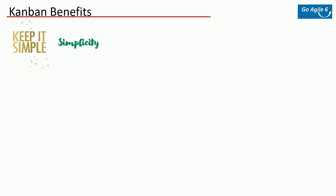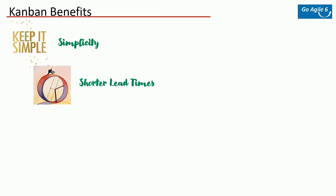Let's look at some benefits of using Kanban. Number one is simplicity — by far this is the least invasive agile framework: fairly simple, flexible, and easy to execute. You don't need a lot of transition or knowledge compared to other frameworks. Number two is shorter lead time. Cycle time is a key metric for Kanban teams — it's the amount of time it takes for a unit of work to travel through the team's workflow from the moment work starts to the moment it ships.